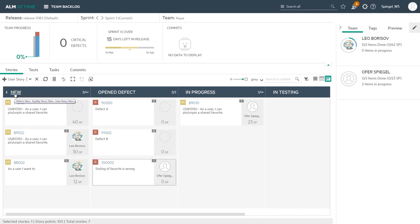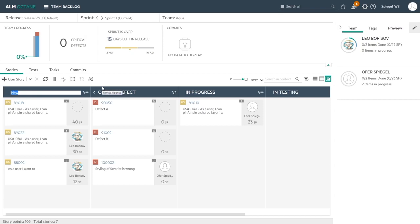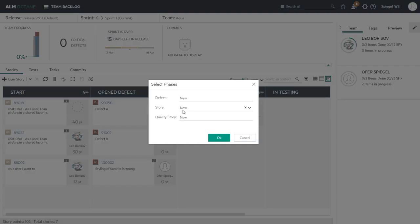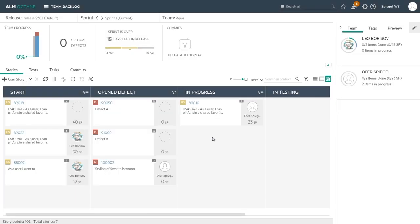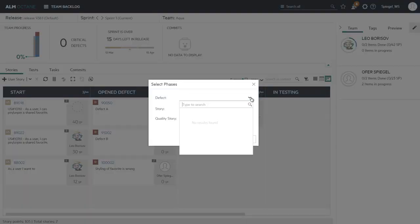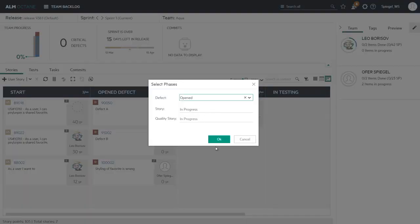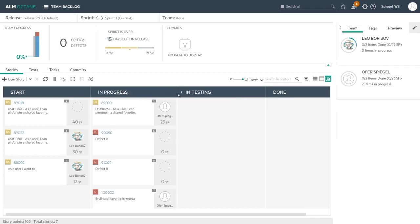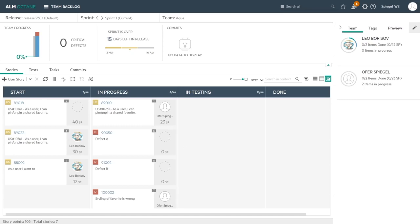I can also as a team leader customize that board. I can rename the label, the title of a lane in the board. Instead of new, we'll call it start. I can see by the tooltip which phases of each is represented in that lane of each type of story. I can also merge two or three together. For example, the in progress now representing only the quality story and user story in progress phase. But I can add to that also the opened phase for defects. So the open defect and in progress will be merged into one. So we see the defects and stories together, and by that customize it further for the sake of the team to work with their fashion as Kanban usually calls for continuously adjusting the process that we are working on.